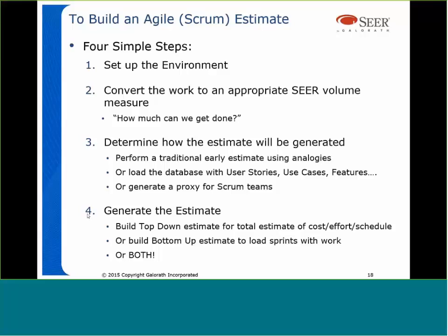If they think it's going to fit, what are the parameters that have to be adjusted that are in reality related to what we can actually affect on the project itself? One example would be maybe we could really hold requirements volatility in. Maybe for this set of user stories, that's not going to change. Exactly what the story says is what we have to build, and we're comfortable with it, and the product owner's on board. All right, so maybe I can reduce requirements volatility, and now this thing fits for that sprint. Okay.